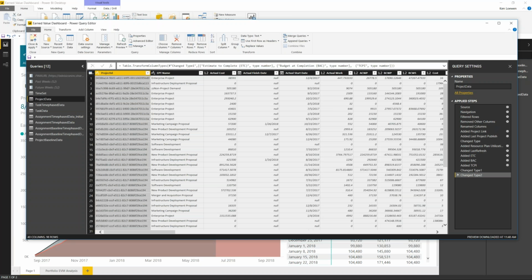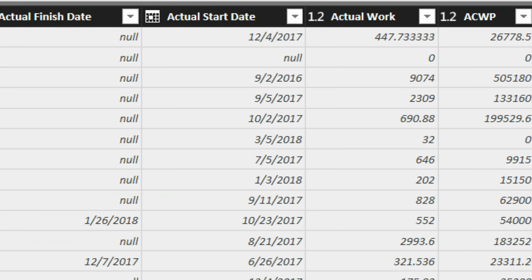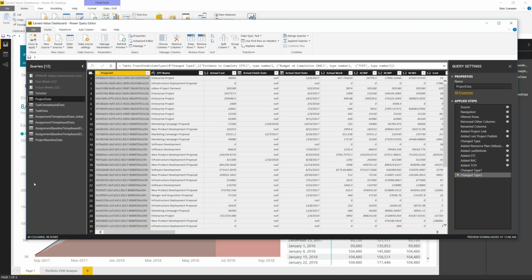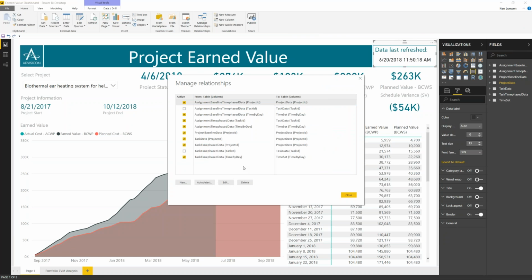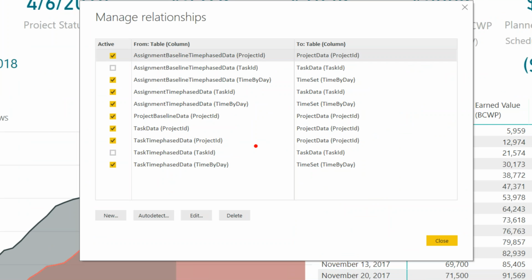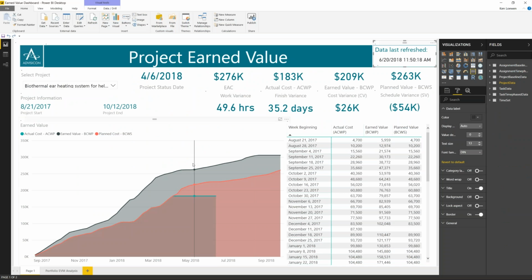This is a query that goes against project data in my Project Online information. And so I'm constantly able to update the information based on the current state of the projects when the project managers update them. Once I've created all of these data queries, I build a relationship between those data queries so that I can then reference that project baseline data; I tell it is tied to project data. And I do 1, 2, and 3 day classes that will walk you through how to do this.